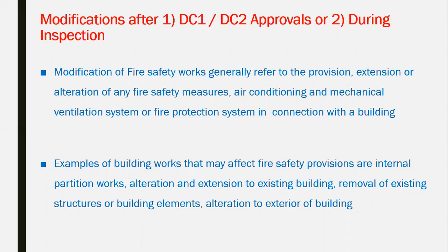So you have to revisit and submit again for DC1. In this case, you don't need to submit the full project as a package. You need only to submit the affected drawings, highlighting the modification, justifying the reason for the modification. If it is two or three different reasons for the modification, you have to give a code for each one: modification type 1, type 2, type 3, and give a description why you are modifying.